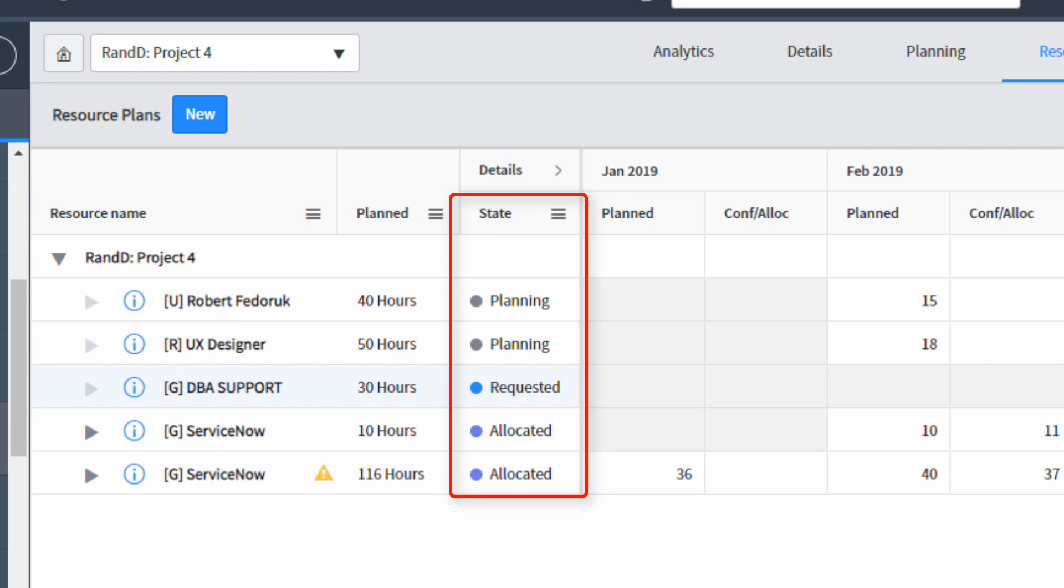The state column gives you an idea of what the resource plan state is in its lifecycle. The planning resource plans, for example, with a gray dot beside them, have not yet been formally submitted to resource managers. Whereas the blue dot shows that the resource plan has been requested.